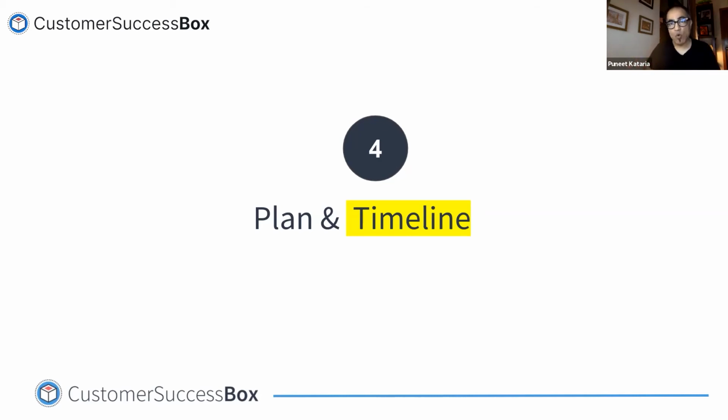We plan to onboard you at the end of, let's say, 8 weeks. So 24th June, or let's say 2 months, easier for me to calculate, June, July, August. So on 25th of August, you will go live. So literally mentioning the go live date in the kickoff meeting is such a powerful piece.